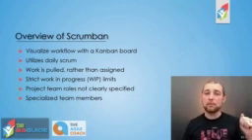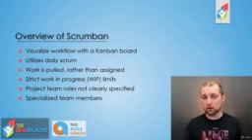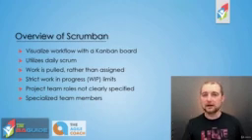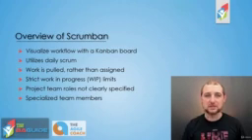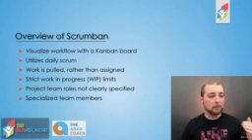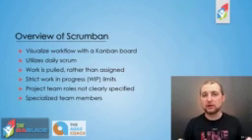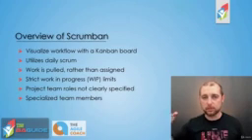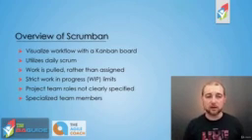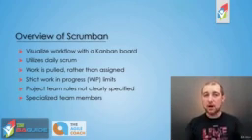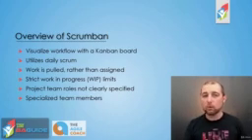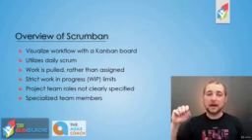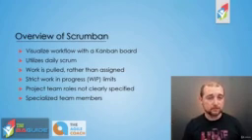You also go in and you pull the work rather than being assigned the work. So in Scrum, you are really assigned that work. Those work items are committed for that iteration, that sprint, and you're assigned to complete various tasks and various work items. But in Kanban, you're pulling that work. You're going in and saying, yes, I can accomplish that high priority task. You take ownership of it and move it into the doing column. And that is the same for ScrumBan. You're actually pulling that work. You're going and deciding what work you should be accomplishing and moving and taking ownership of that.